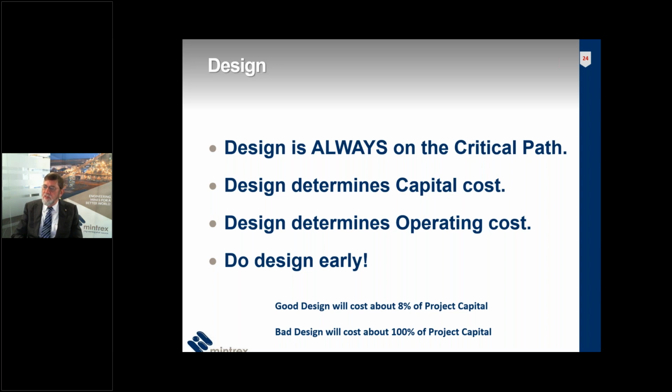So design is the beginning of every project, because until you know what you're doing, you don't know what you're doing. It's also one of the opportunities for early works and for project de-risking. It's really something worth considering. Good design will cost you about 8% of the project value, and that sounds like a lot of money for some paper.